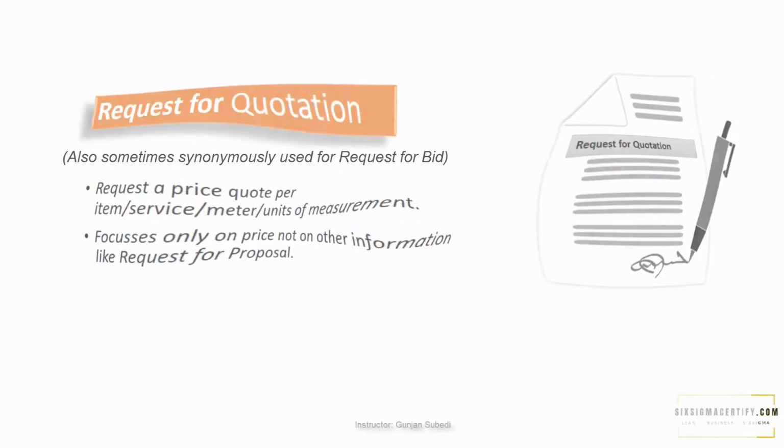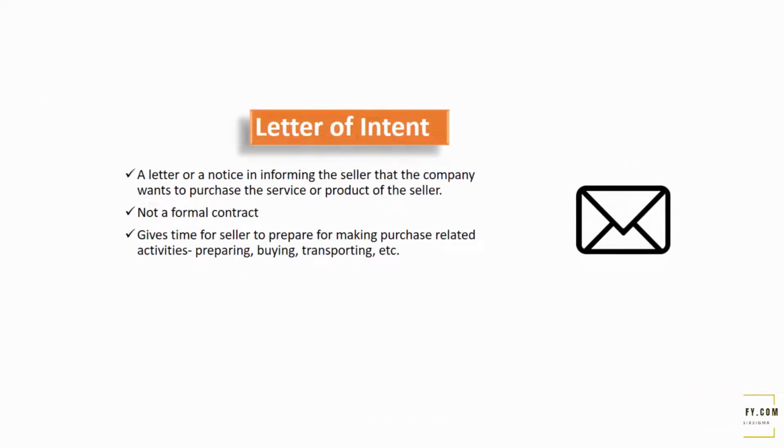The letter of intent. What is the letter of intent? It is the letter or notice informing the seller that the company wants to purchase the product or service from the seller. This is not the formal contract, but it gives time for the seller to prepare for making purchase related activities that are needed in preparing, buying, and transporting, etc.